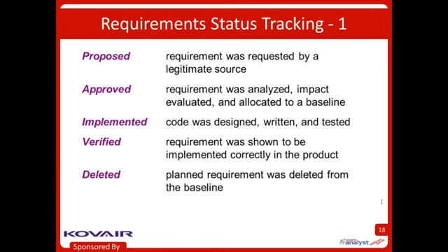But maybe along the way, for some reason, we decided not to implement a particular requirement, and so now it has a status of deleted. Or perhaps at one point the requirement was requested, but it was not approved, didn't make it through the first gate, and therefore has a status of rejected. Now, rejected is kind of helpful because that lets you keep track of those requirements that might have been proposed at one point, kicked out, but then it comes back again. So that sometimes happens. They're like zombies. They're not always really dead.